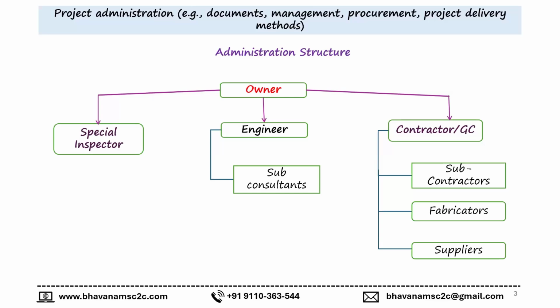So what I do is I will hire a contractor who can design the building by himself and construct by himself. So I will give him the overall package in order to do that particular building. That is what I mean to say, which is called a design-build project. We don't require a person called an engineer in that particular project.